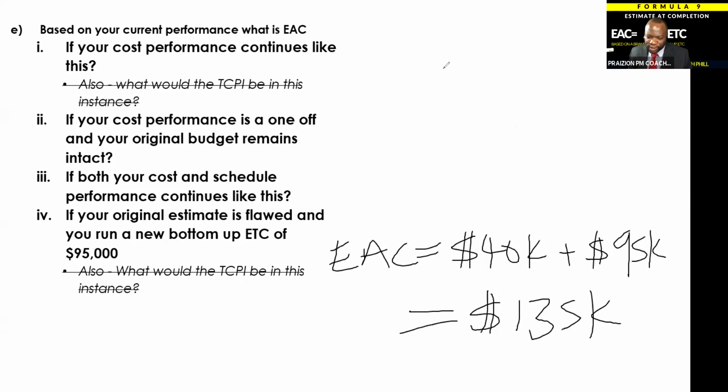So Willanda says the at budgeted rate is also yes. Atypical means it's not going to keep happening, so we can use our budget. Atypical means it's not going to continue happening, so we can use our budget. Typical would mean the cost performance is going to just continue like that. So that's the language that we use.